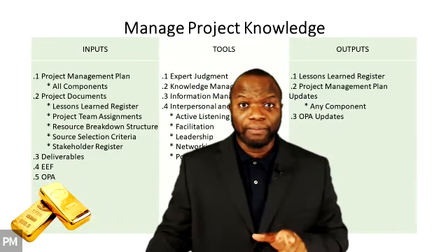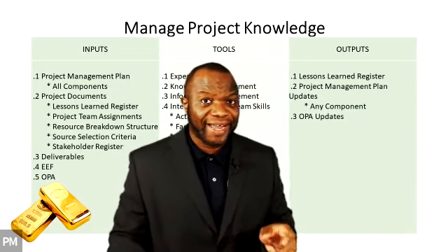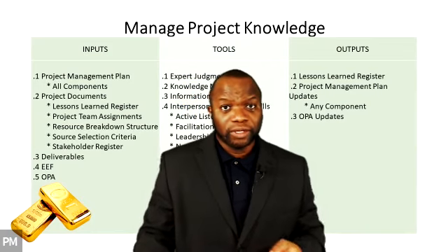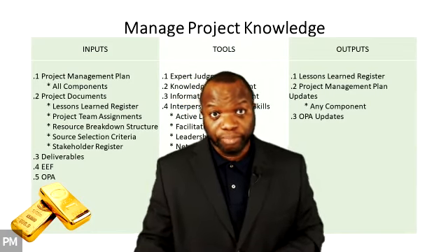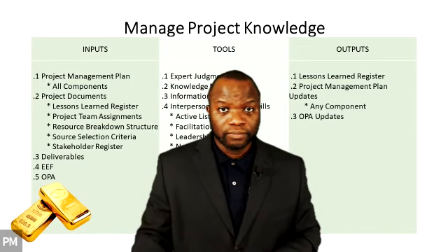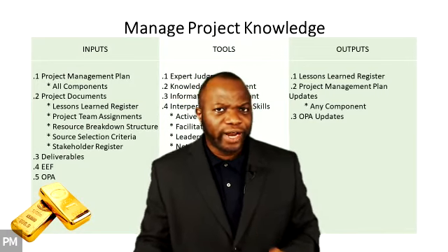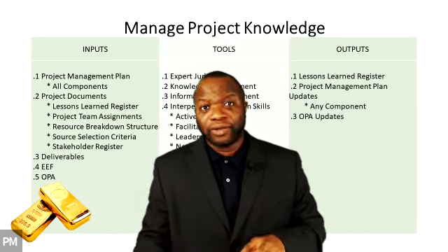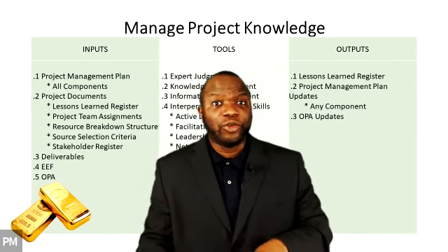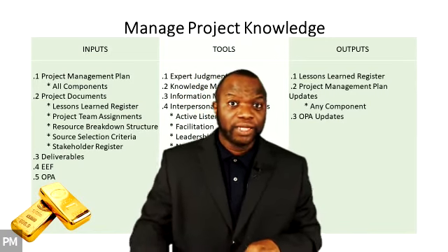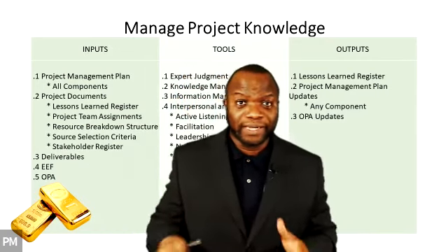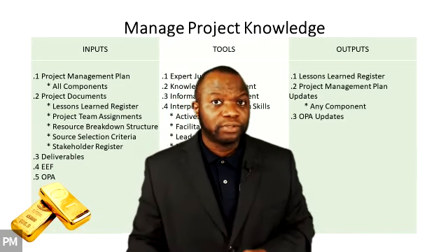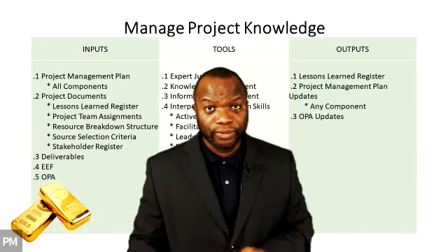It needs to become your organizational process asset update, because you want people to follow that new way that you found to get better results like you did. So don't confuse the lessons learned register with your OPA updates. Here, the updates are not your lessons learned. Here, the updates are the newfound ways of doing things that you need to update in a process document, a standard operating procedure document somewhere. I hope that makes sense to you.